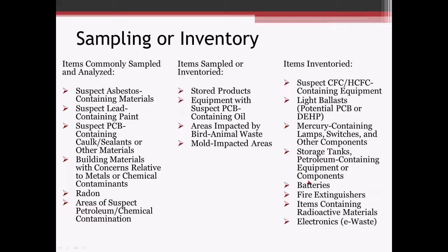Storage tanks, petroleum-containing equipment, batteries, fire extinguishers, items containing radioactive materials, electronics. These are all standard disposal requirements. You know what hazards you have when you have them, so there's really no sense going ahead and sampling those.